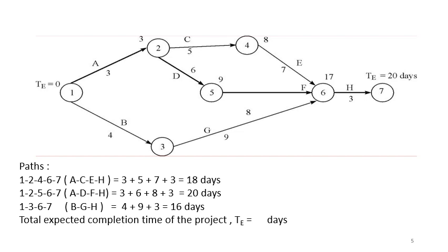So based on the data given in the table, the network diagram has been drawn, keeping in mind the precedence relationship of activities. You can see here in the network diagram, activity A has a completion time of 3, that is, activity A's total expected time is 3, activity C expected time is 5, activity B has an expected time of 4.